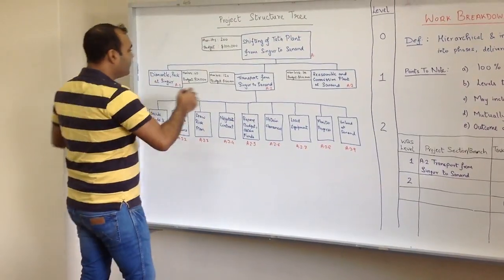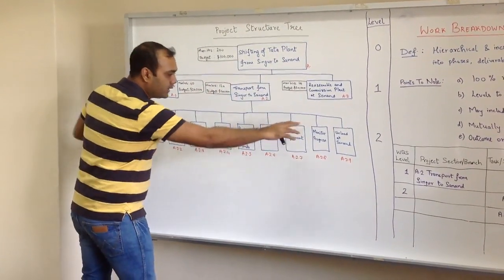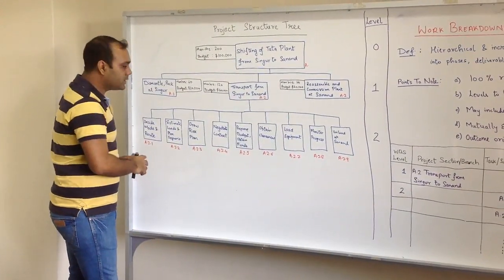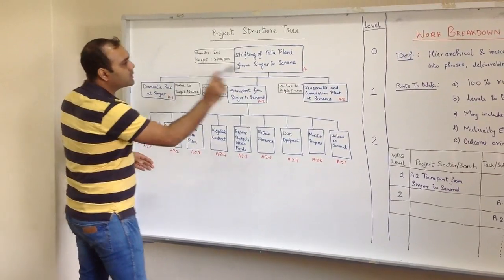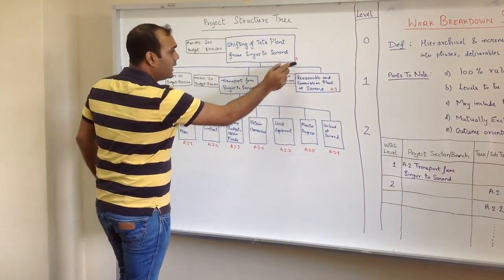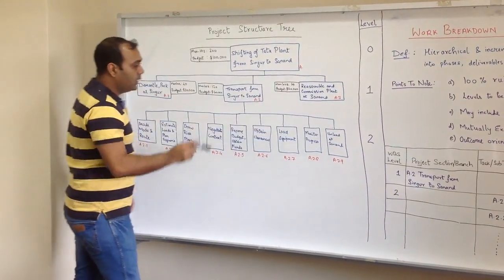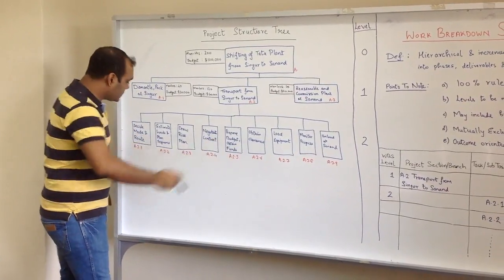As you can see, I've divided only this one into further work packages. Each of them has a nomenclature attached - it's very methodical. A is given here, then A1, A2, and A3, and from A2 all these arise: A2.1, A2.2, A2.3, and so on.